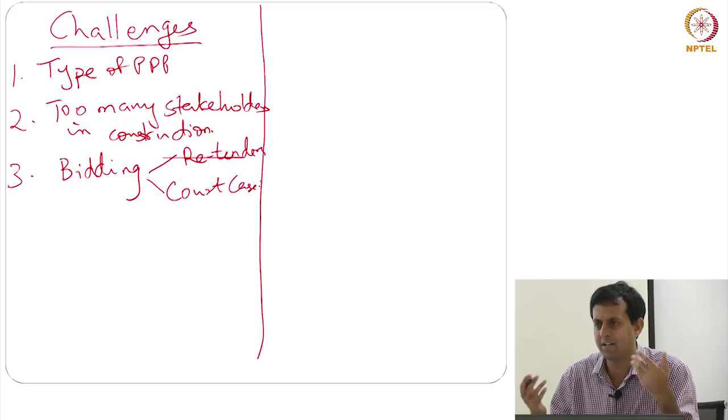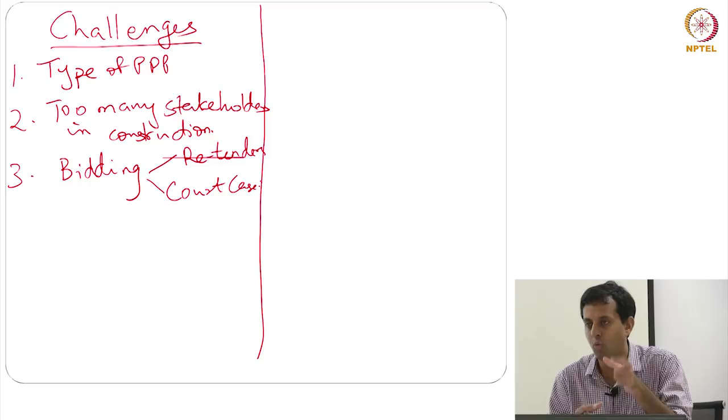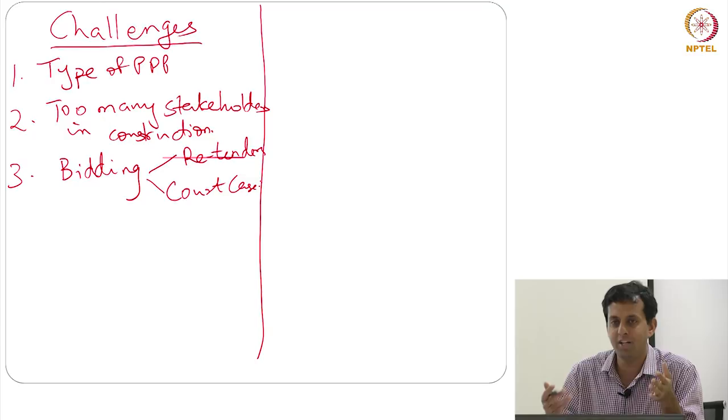So you decided to modernize the two, but you decided to modernize the two simultaneously, and you ran a simultaneous bidding process for both. The problem with that was you were not sure if a single entity could do both at the same time. So you also put in a clause saying both of these cannot be performed by the same person. You don't want to put all your eggs in one basket. Yamini was pointing out, maybe you should have staggered it, do one first and then the other, because in this case the worst fears came true. GMR-led consortia were winning bidders in both cases.